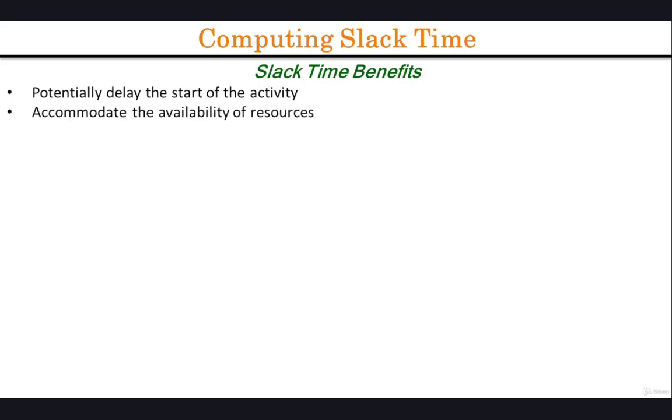Second, accommodate the availability of resources. Internal or external resources might not always be available when we need them. Slack time provides us with a way to adjust our schedule, as shown in the Gantt chart, without compromising the completion time of the overall project.